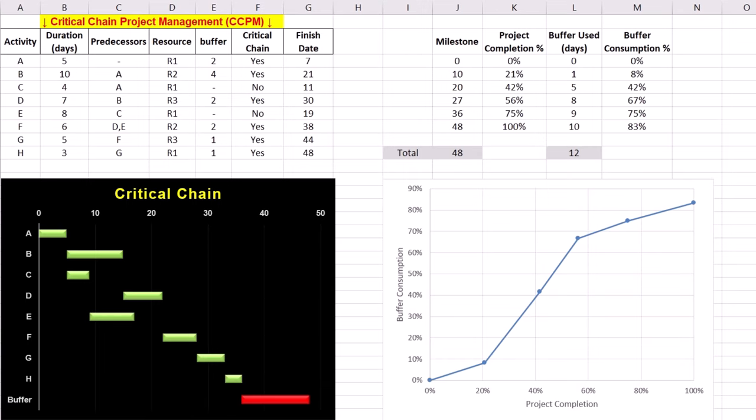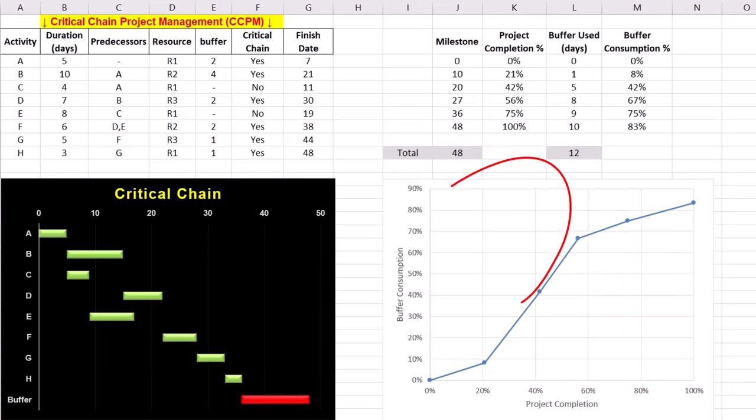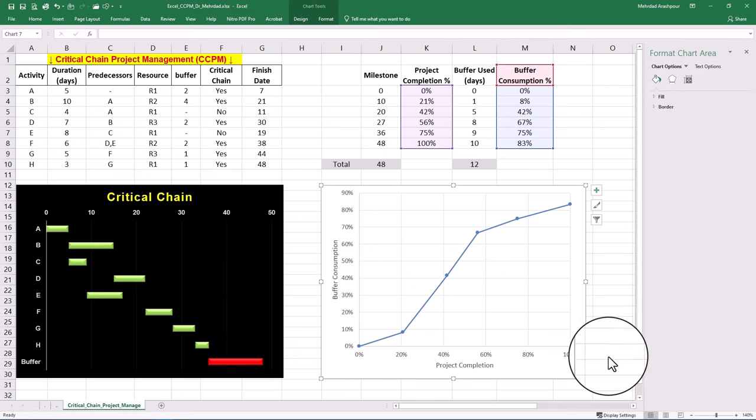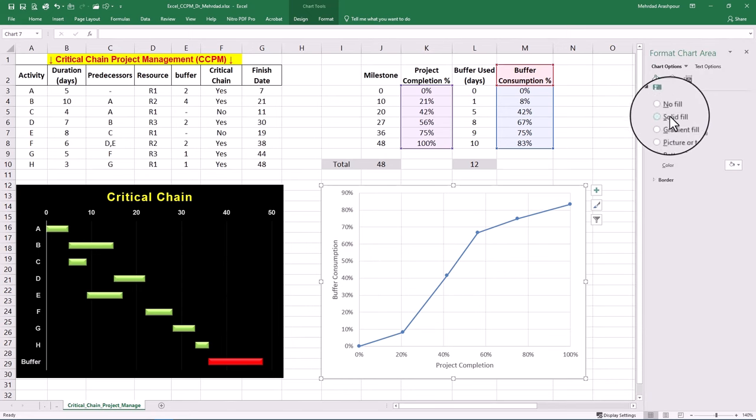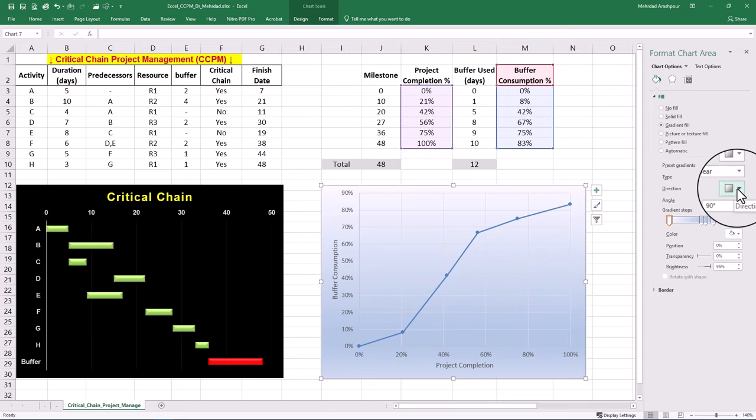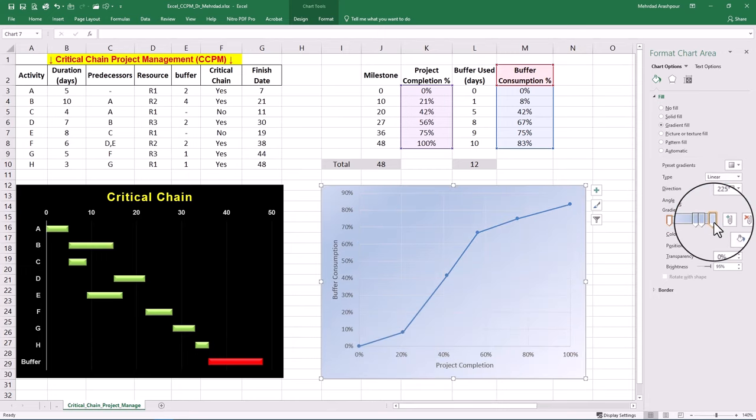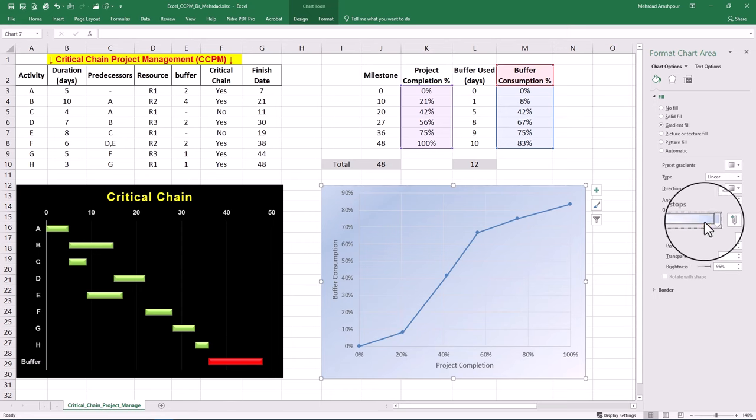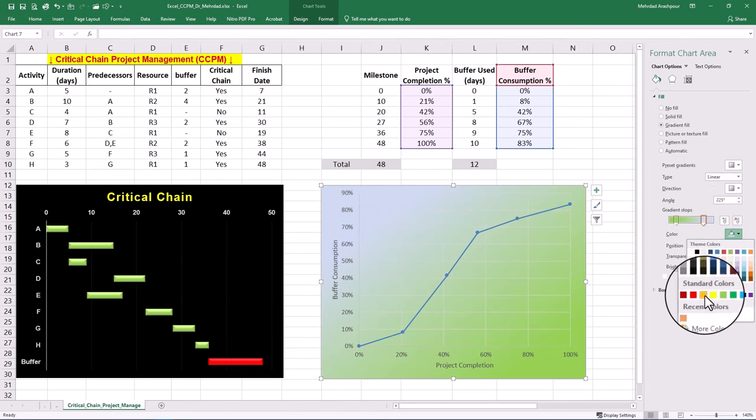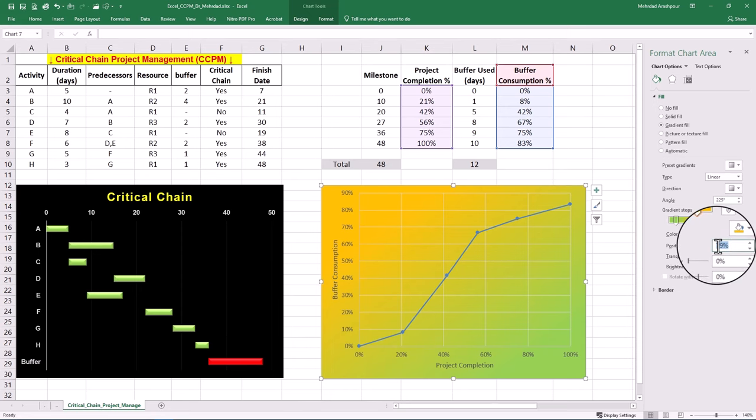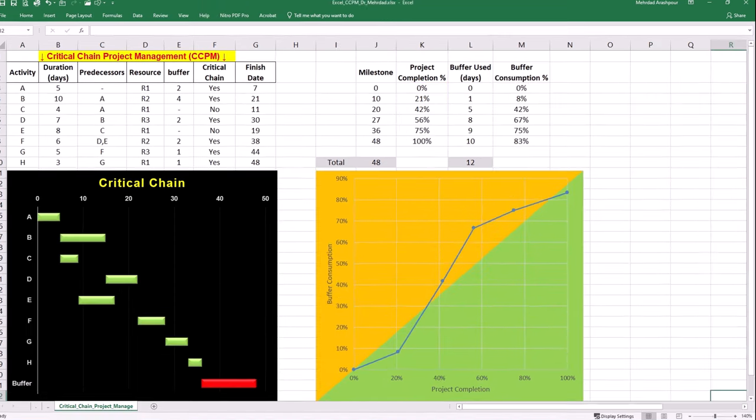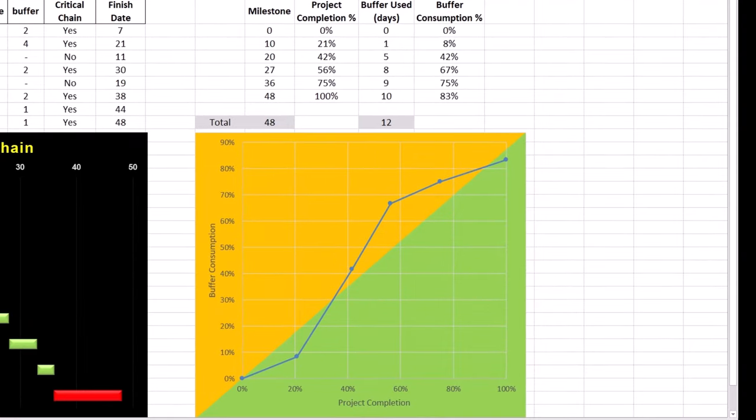Desirable region on this chart is close to horizontal axis where maximum completion is achieved with minimum buffer consumption. Undesirable region is close to the vertical axis where minimum progress is made with maximum buffer consumption. Let's create a fever chart and color code both regions. Right-click on the graph and select format chart area. Choose gradient field, select linear type, and choose the desirable direction. Make sure there are two gradient stops and choose contrastive colors like green and orange. If the trend line enters the orange zone, it's a signal that corrective actions may be needed to get the project back on track. The green zone indicates sufficient progress relative to buffer usage.